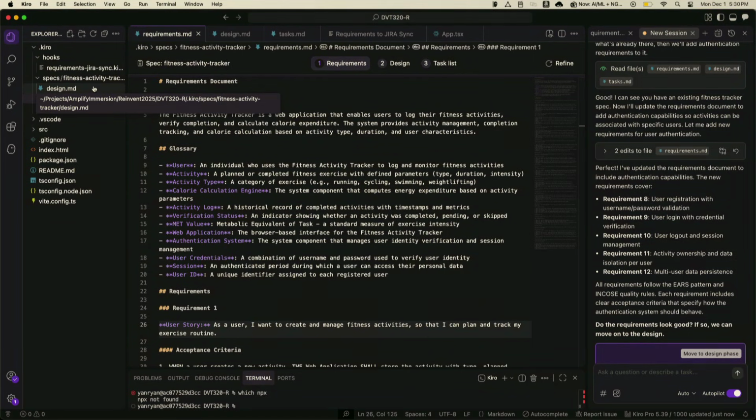So when I've done the work there, I slide it over, I say this is done. If I need to make any more changes, I'm going to create a new spec, and I'm going to deal with it there. So that I have this kind of running list of specs. You technically can go back and modify an existing spec, even if all the tasks are done. But I find that makes it really muddy to be able to keep track of the work I've done and how I've done it, and to manage it that way.